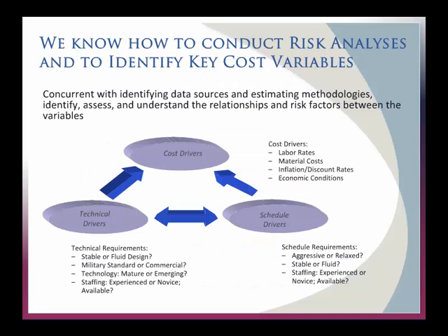We also know something about how to conduct risk analysis to identify key cost variables. So you've got these cost drivers like labor rates. What does it cost to get engineers to work on this? The cost of your materials, inflation, economic conditions. These things we can't control, but they're going to drive our costs. And you've got technical drivers. So these are design decisions, things like that.